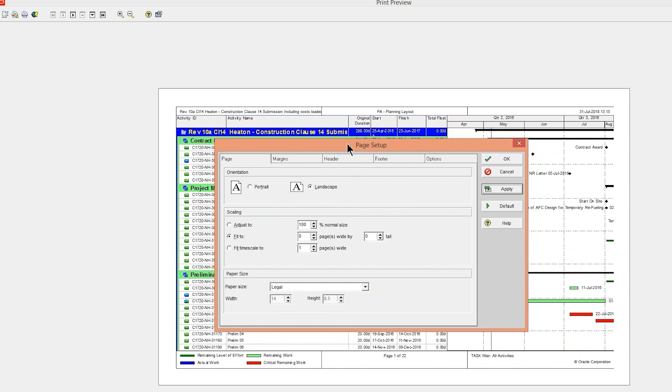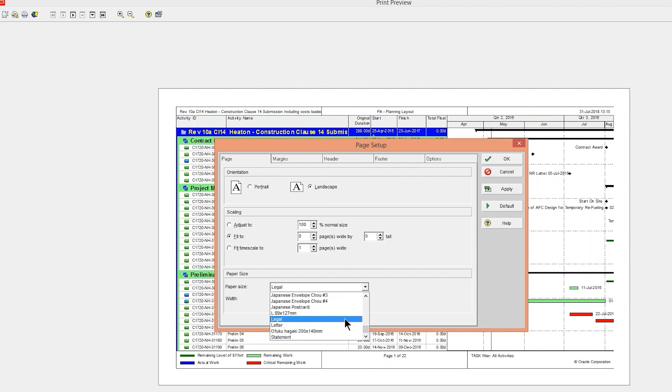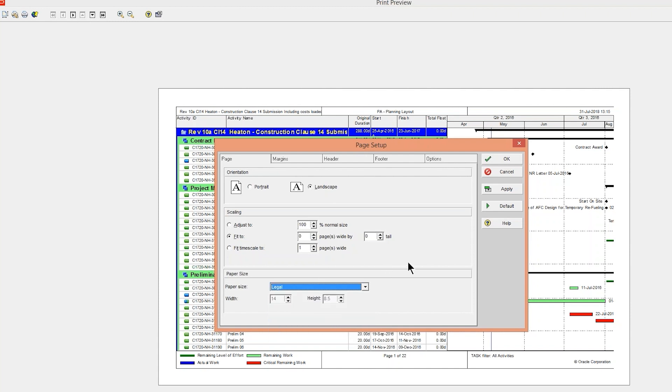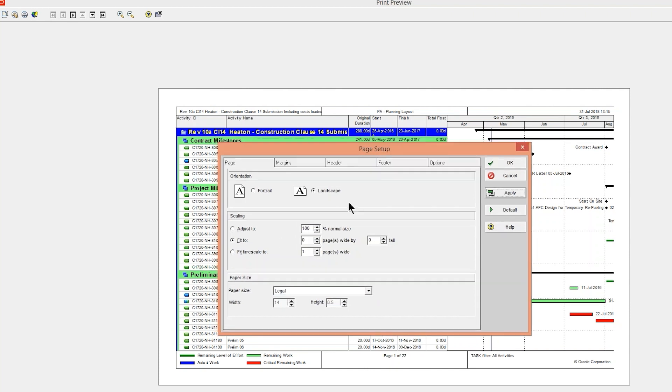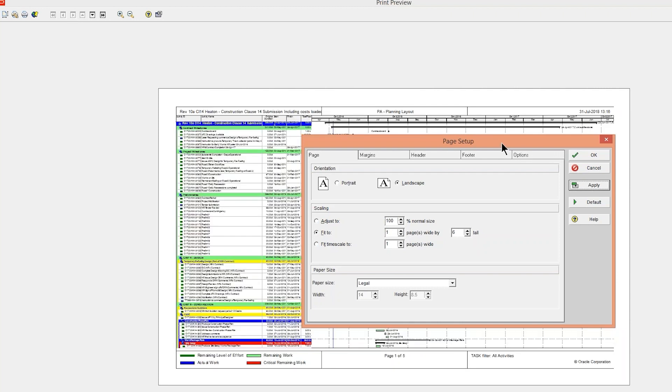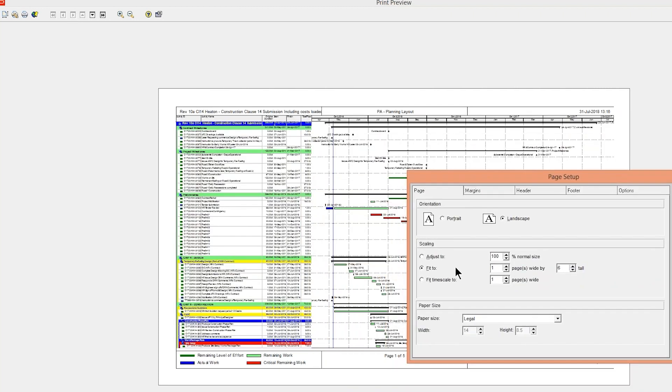But the wider you can get it, the more stuff you're going to get on that page. And if it's just a PDF printout, you don't really care, right? So, what you could do also, I think, is do a custom. Was there a custom in here? I guess not. I thought there was something custom, but we'll stick it to legal. So, now I've got stuff almost on one page. But then we can work with this, fitting the timescale and fitting stuff to a couple pages. Let's go one page wide by a couple pages tall. Setting this to one page wide will get the whole Gantt chart on one page.